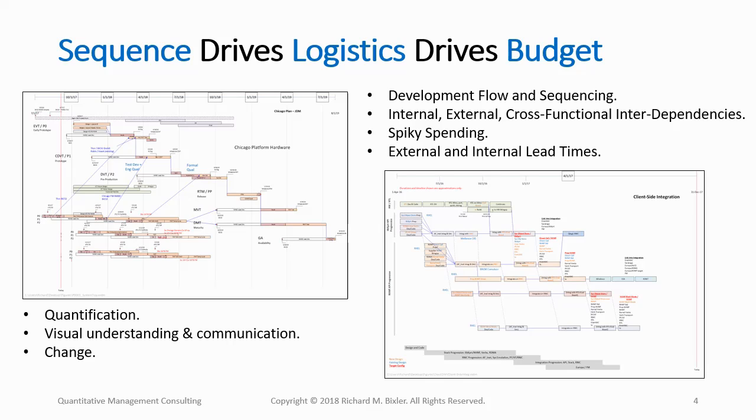The hardware figure at left shows some detail of development of a platform, with a sub-project developed slightly in advance of it. Material lead times, dependency management, plus financial management drive hardware development to the phase development shown. You might think of each phase as a giant sprint. There's a large degree of parallelism. Financial management is a large factor in hardware plans because prototype cost is significant and is budgeted at the start for the program as a whole, then again at each fiscal year, and reviewed in detail each fiscal quarter.